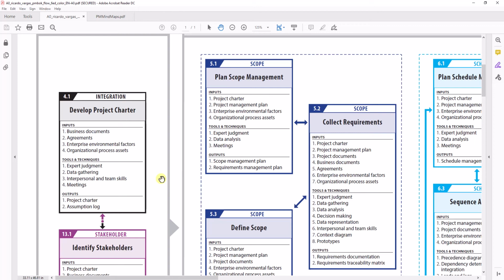Of course, you know that executing, and monitoring and controlling, are not really in sequence, they go parallelly. But please remember, as I repeatedly tell you in many sessions, sometimes it's easy to get this question when everything goes in parallel: how can an output that appears later in the process be used as an input today? The idea is you don't do everything in a real sequence. With the so-called rolling wave planning, version 0 of all the plans and documents you create sort of at the same time, and fluidly they interact with each other.